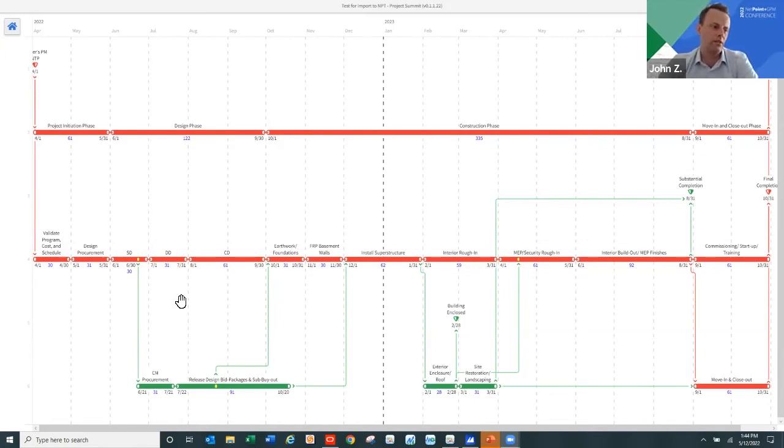Is there an activity limit for P6 activities into NetPoint? I don't think there's a technical limit, but there's a practical limit, because if you get too many, it can be a little bit complicated. I think I heard him say this morning that maybe up to 300 is a sweet spot. I've done one with 650. It was a pretty big schedule, and it took some navigation to get around from one part to another. I think more practically speaking, though, 100, 150, something like that.